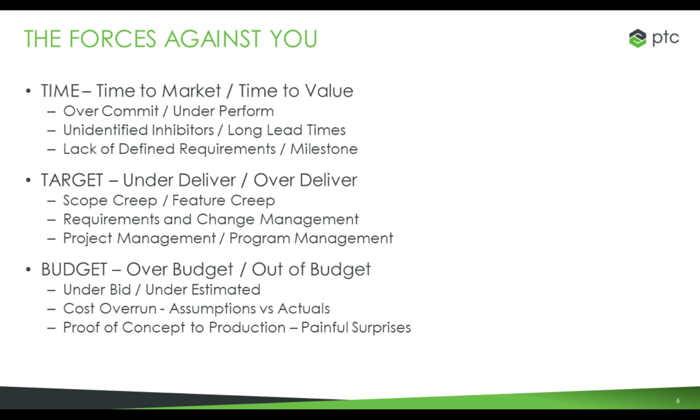Those are things that are very difficult to manage, and they do happen. You can get hit by things like tariffs, right? If you're trying to hit a specific price point in the market space, it could be that you didn't calculate the impact of a tariff on specific components that are either being bought or manufactured overseas. And then lack of defined requirements.